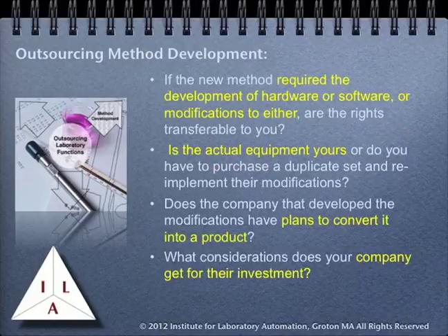If the new method requires the development of hardware or software, or modifications to an instrument, are the rights transferable to you? You don't want to be in a position where every time you upgrade or modify a system, you have to pay the vendor a royalty. You should have as thorough documentation as possible on any of these types of system changes because the vendor's personnel may not be available the next time you need them. If equipment is being modified, is the actual equipment being used yours, or do you have to purchase duplicate pieces of hardware and re-implement the modifications?